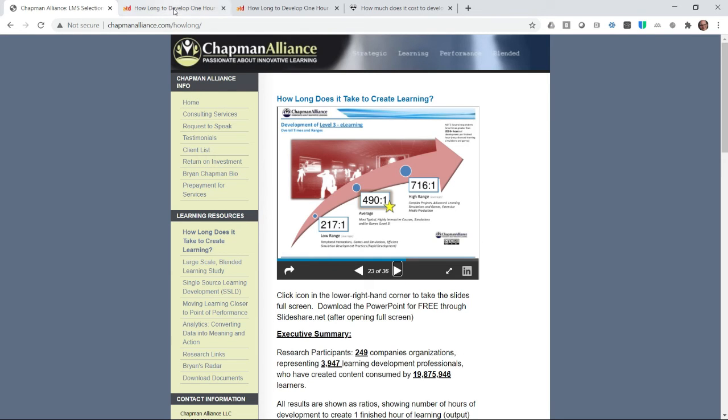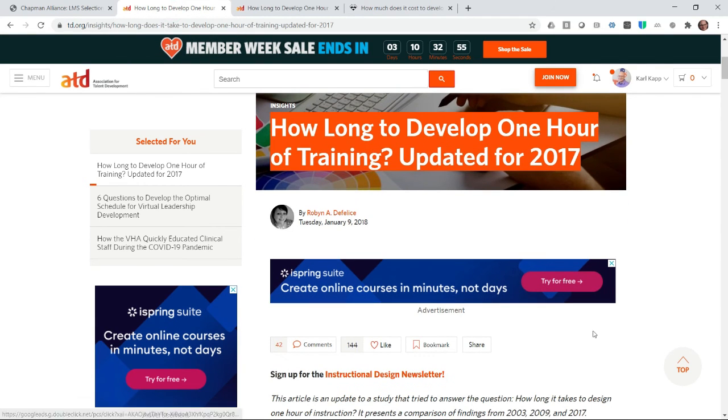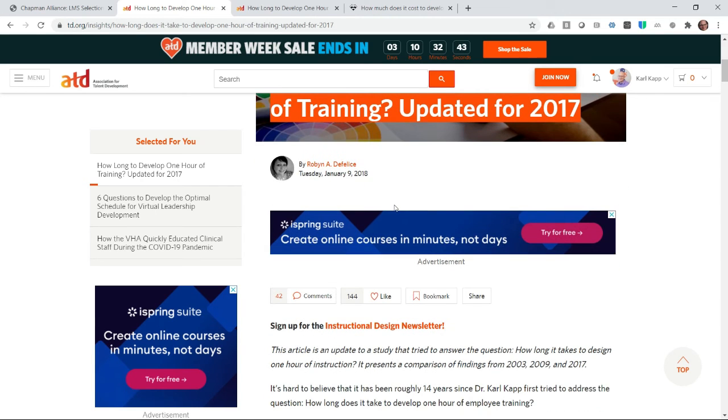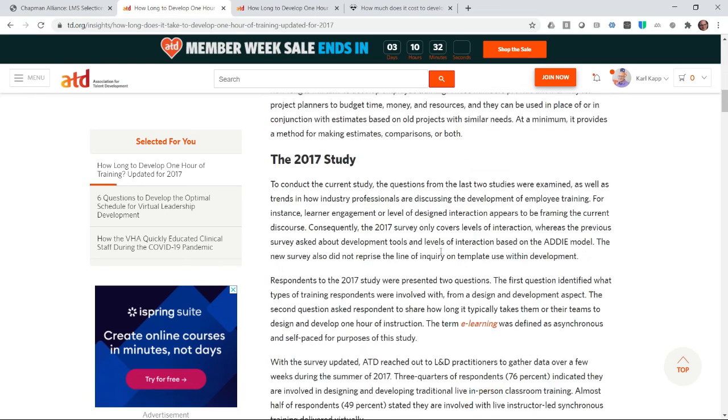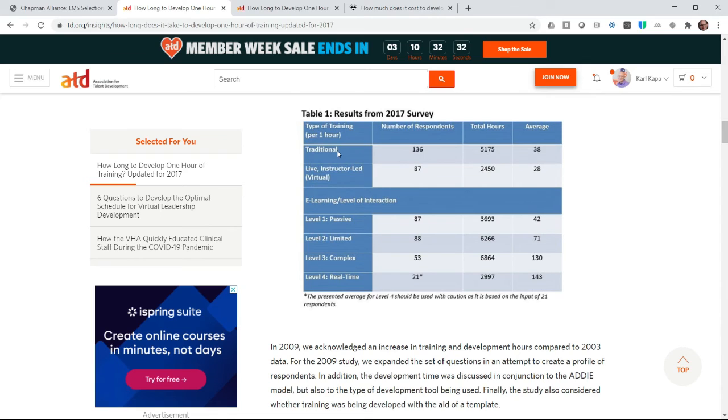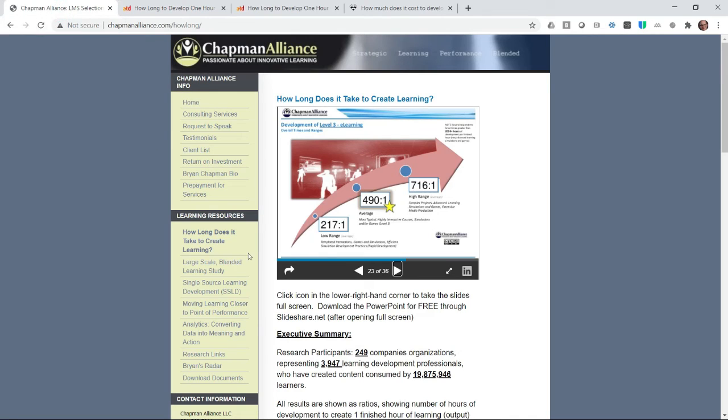Now, another place to look is a colleague, Robin DeFelice, who has spoken in this class and given some of her insights and wisdom. She did an article in 2018 called How Long to Develop 1 Hour of Training. She updated it from past work that she and I had done way back, starting in 2003. This gives you some sense of the numbers. If you're going to do traditional training, here's how many hours these people did, on average 38. If you're doing level 1, which is relatively passive, that's 42 hours.